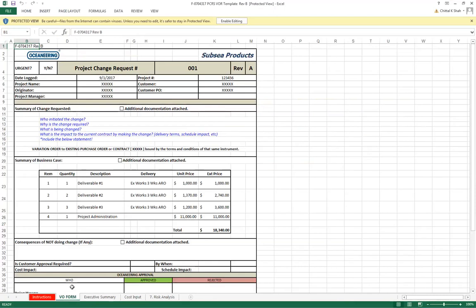So these are more internal variations than customer driven? Customer. These are variations to customer. So let's say customer asked you. So you're approving before we ever send it to the client for approval then? Correct. Internally, we want to make sure that we cover what we need. Sometimes with variations, we don't put a change in delivery, or we don't say, hey, you're adding this, but it's also going to impact, not the price, but the way your thing performs. So covering those bases is what we try to address most of the time.